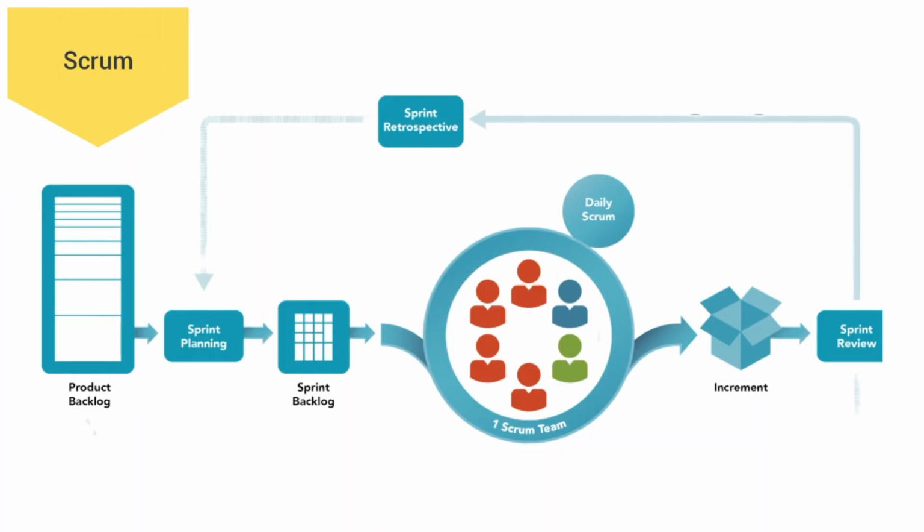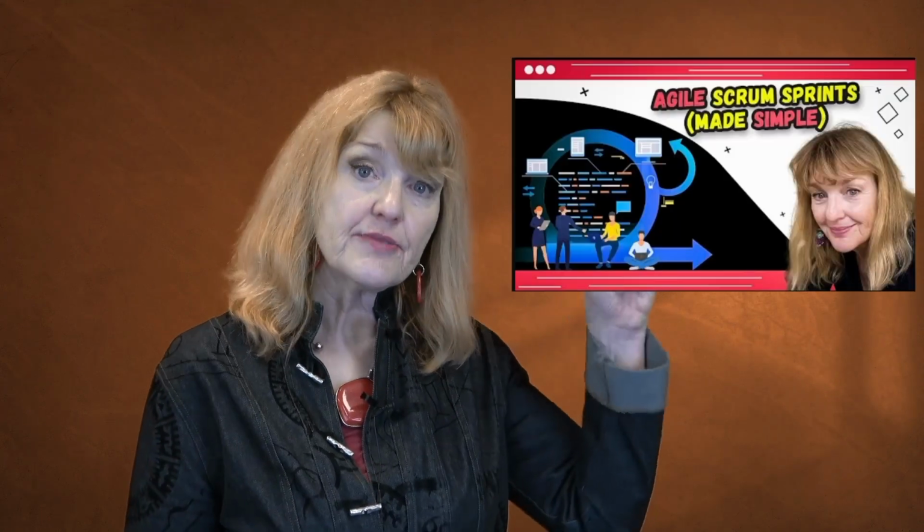up. The first, Scrum. The Scrum model is a well-known method for teams delivering complicated projects in incremental iterations. Each iteration is referred to as a sprint, and it lasts about 2 weeks, although this does vary. There are clearly defined roles such as product owner, scrum master, and team. Routines like backlog refinement, sprint planning, daily stand-ups, and sprint review. And tools like Scrum Board, user stories, and Icebox. Watch this video where I give you more details on the way to use Scrum.